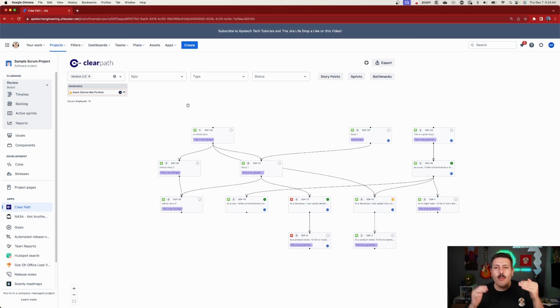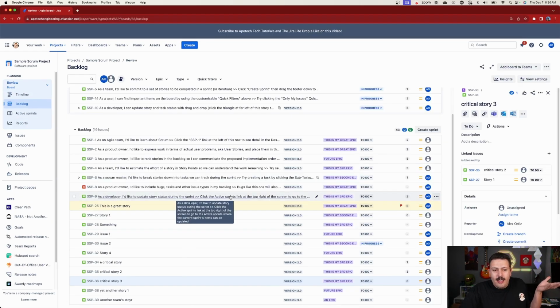And now you can more tactically work your way down and figure out the plan for that sprint, right? Now your team is going to be able to say, okay, we know we have to start with these 3 because these 3 unlock the next level. Very much in a Super Mario effect, you can't move on to the next level until the previous level is completed. And this is going to help you visualize this, because when you're looking at this backlog again, you have no idea. Like, where do you start?